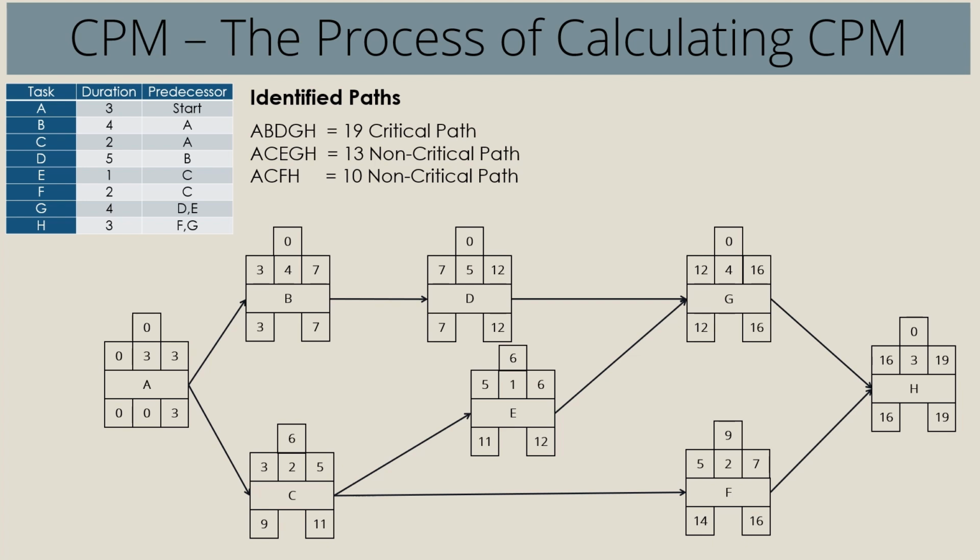So right away, if you are on the critical path, you know that free float will always definitely be 0 for all of these. But I'll just show you a few examples just to prove that. For example, for calculating activity B's free float, we would take the early start of its successor. So that would be 7 minus its own early start, minus its own duration.